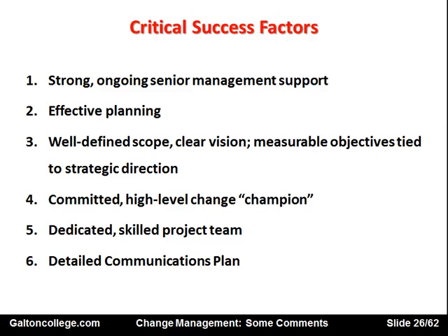And of course there should be a detailed communications plan. A detailed communications plan is vital to make sure that everyone involved knows exactly what's going on, what the issues are, what the problems are, what the advantages are, what has been achieved, and so on. The detailed communication plan could involve calling regular meetings or making newsletters available through the intranet, the local area network that perhaps the company uses, or some other means of communication. So there should be some way of communicating what's happening.